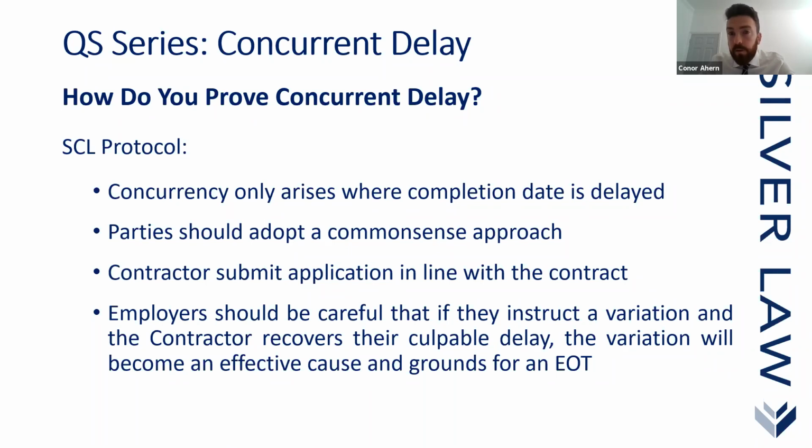It is complicated, and the best chance a contractor has of dealing with it and having a successful outcome is obviously at the time, rather than trying to deal with it retrospectively, which can become quite difficult, but not impossible. The contractor should submit applications in line with the contract. That goes without saying. Adhere to the notice provisions provided under the contract.